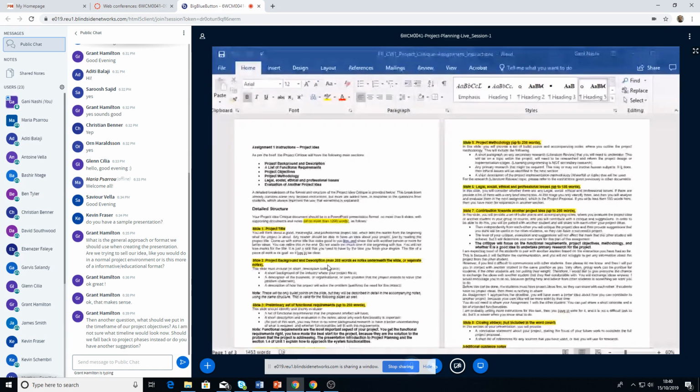It doesn't matter, because a Gantt chart, by definition, is a working document. It's not that you put some dates in the Gantt chart and then they are set in stone. The Gantt chart is a live document that changes according to the progress of the project. If you set out to do, for example, the designs by the end of February, and then you finish them in mid-February, then of course you change the date in the Gantt chart, and you move on with the other tasks. You don't have to stick to the Gantt chart.